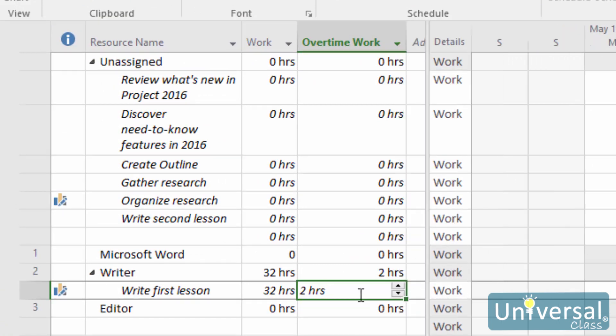You should note that if you enter overtime, Project 2016 will assume that effort-driven tasks have shorter durations. If that's not true, you'll have to edit the task's duration.